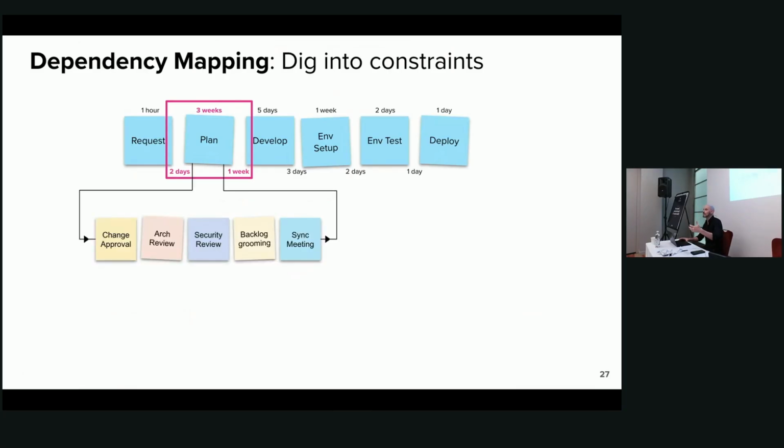If we map that into the sub-process level and understand what are the activities that are happening in that stage, then we get a higher degree of detail. We get more clarity on what's happening. We can go into detail with that. We can do the same cycle time calculations and wait time calculations. But we can also just say, which of these areas are the most challenging or problematic or manual or annoying, and use the information from the team that way, right? That's an option we always have. We don't need data for everything.